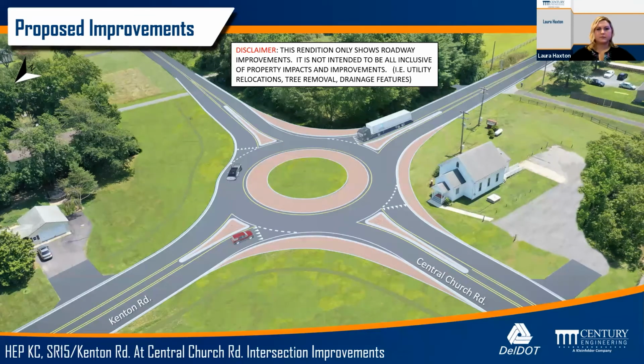And then this may be a follow-up to it. Will construction be done at night? So currently we are planning for construction to happen during the daytime hours. If night work were to occur, DelDOT is required to send out a night work survey. So if we did start to consider night work, you would be notified with a survey and whatnot. But as of right now, we are not considering night work.